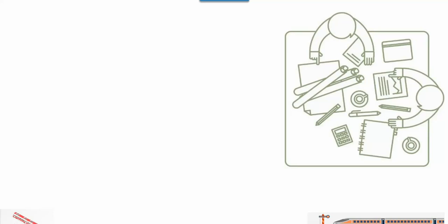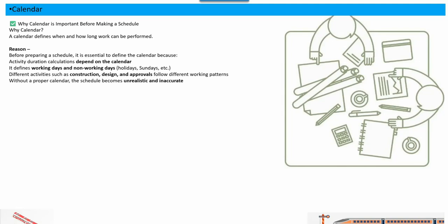In this video, we are going to see the importance of calendar. So why is calendar important before making a schedule? Calendar defines when and how long work can be performed. Reason: before preparing a schedule, it is essential to define the calendar because the activity duration calculation depends upon the calendar.